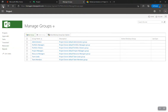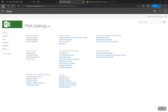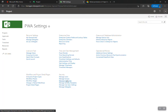Let me break it down simply. Groups in Project Online are the high-level permissions — what somebody can and cannot do. Categories define what they can do to projects, resources, and tasks. For example, they can do something to this project but not that project. So security is managed in two ways: groups and categories.